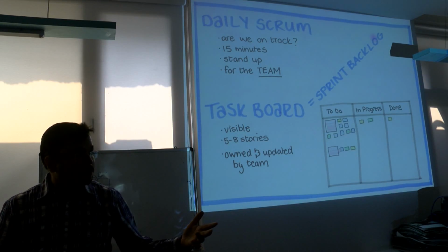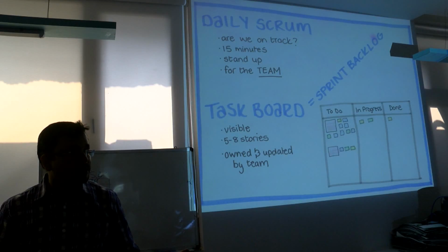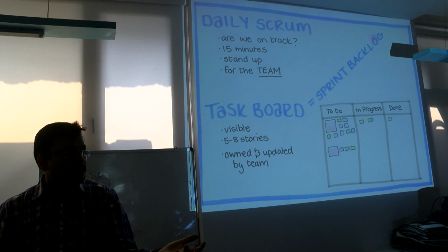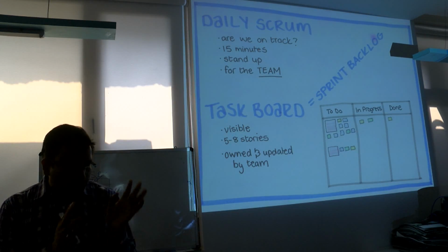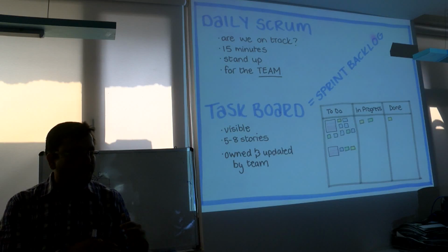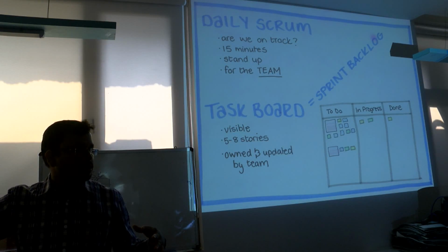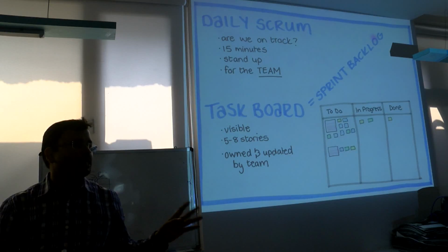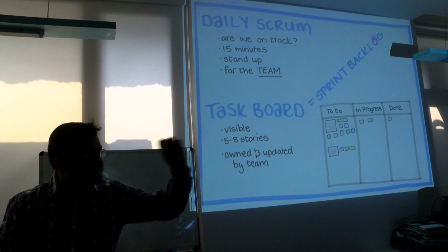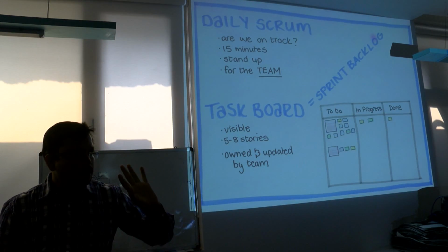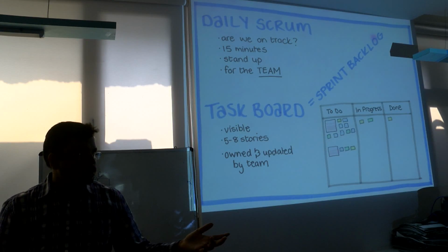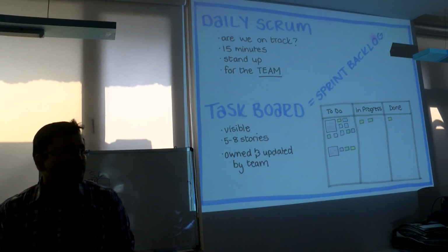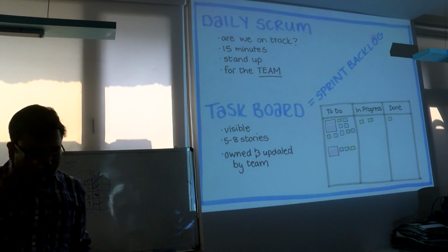So in sprint planning, when you picked up the tasks, you have picked up only those tasks which the velocity your team has allows. If your team velocity is 26, you are not going to pick up more than 26 story points of tasks. Less than 26 story points you will pick up. So if you have taken even a maximum story point task, then you are about to finish that. Or it might be possible there is a task like 10 and 5, 5, 5.